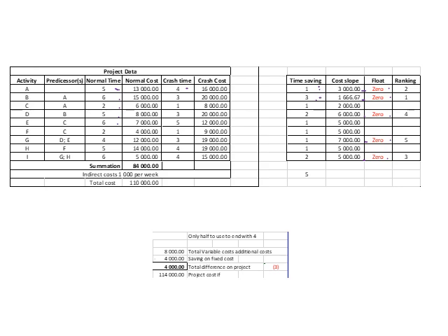Then we rank our items by the lowest cost slope. So we look at item B. Item B is the lowest ranked item because its cost slope is the lowest, so we rank that as our first one, and we can see item A has a ranking of 2, and then items 3, 4, 5.